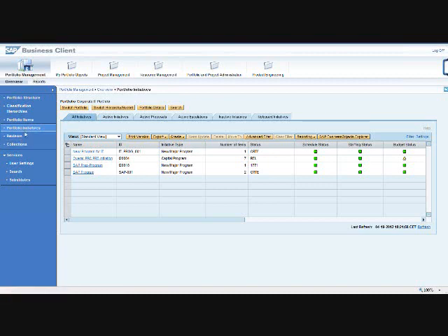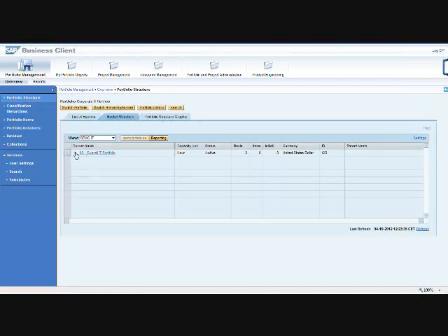Collections are very similar to initiatives, though they're more of a bottom-up collector, so it's many-to-many, and you can group different SAP projects together across different portfolios, so that's really the key there. So I just wanted to explain a little bit of that. Let's go ahead and jump back into our portfolio structure, and as you'll see as we go along, dashboards change, but pretty much any view you're in, you're always going to get a quick snapshot or dashboard that you can set up with the settings by user or at the administration level. So very good information very quickly.